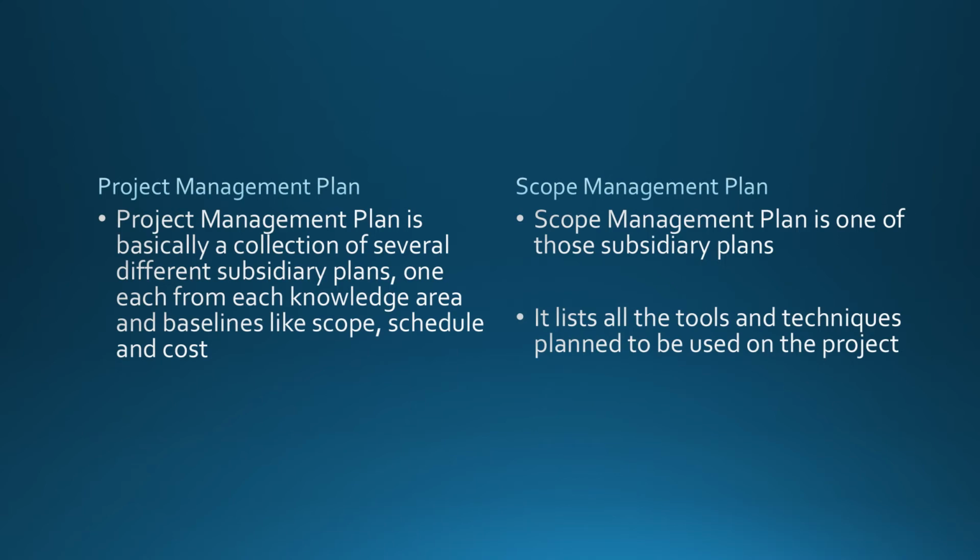So your scope management plan is going to list all those that you're going to be using on your project, right? Not every single tool and technique available in the PMBOK guide in your PMP courseware will be used on every single project. For your project, you might be using just two or three of those techniques. So those two or three techniques will be listed in your scope management plan.